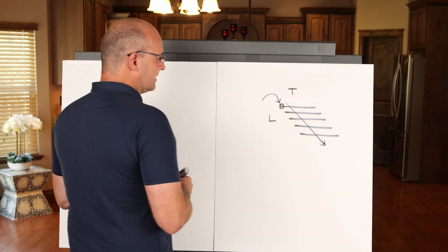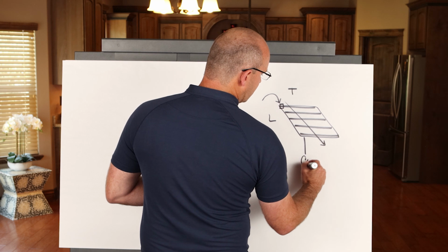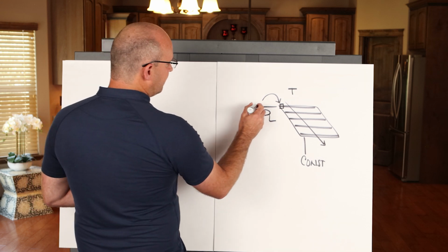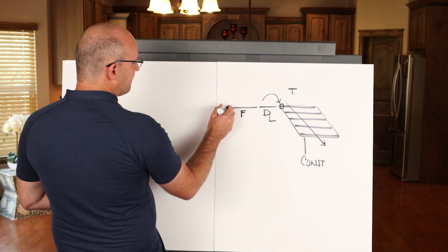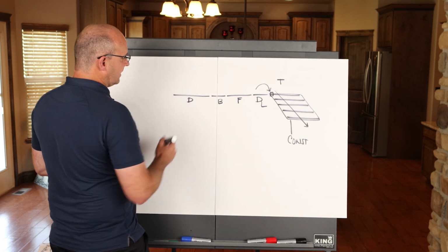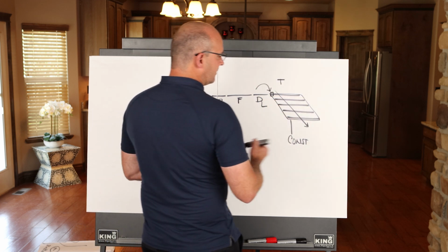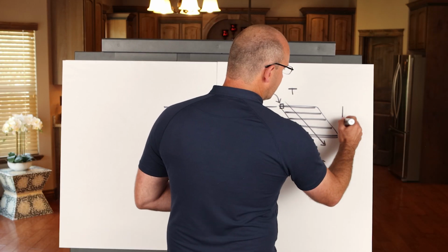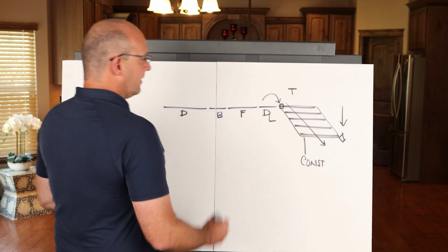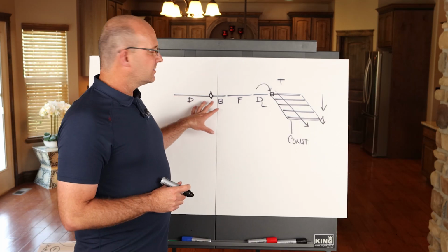So what I want you to visualize is that if this is your construction flow, so I'll just go ahead and write over here construction with C-O-N. You have a deliver, which I'll mark as D, fabricate, which I'll mark as F, a buyout duration where you buy out the trade partners, and then you have design. So the rhythm of the project is really set here. So we begin with the end in mind. If here's the milestone that the project is attempting to hit, we'll map that out and then work it back. That's what provides the milestone for design. This is where the target should be.